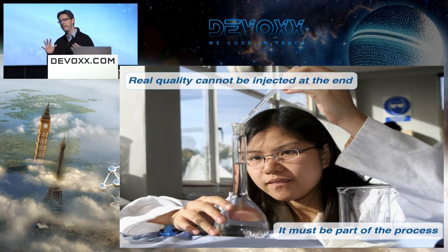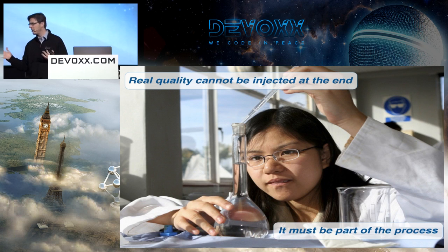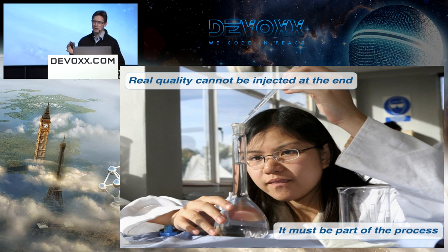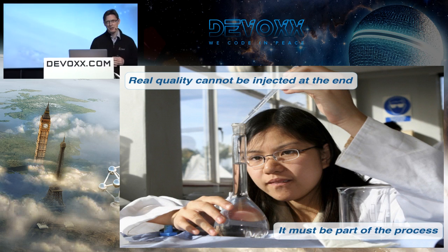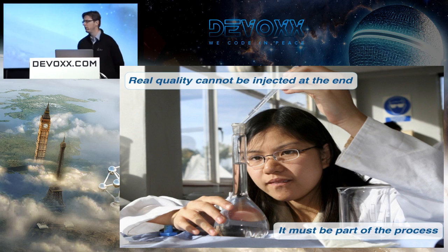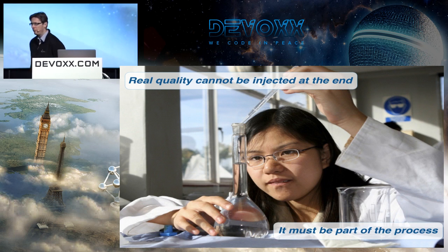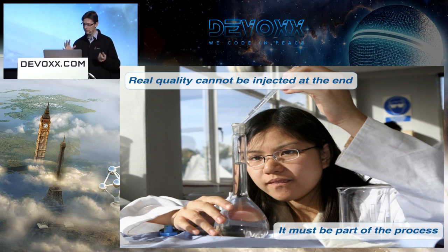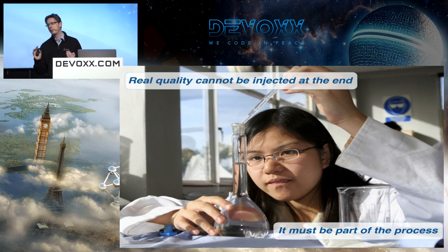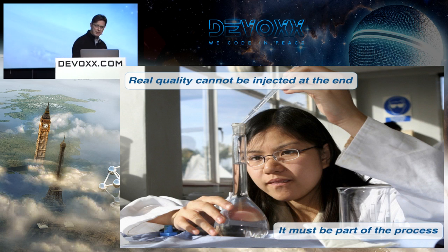You've got to get them in when you're defining the acceptance criteria and then helping with the automation to some extent. The extent to which they will be involved in automating will depend on your teams, but definitely involved in actually expressing the requirements. So typically when you define your acceptance criteria, you're going to have at least a developer, a tester and a BA together, known as the Three Amigos pattern. You can have the whole team, and the whole team's good, but it can cause meetings to drag on and on. But if you can get three people, a dev, tester and BA, that's a good compromise. You get different points of view, different concerns, enough perspective to make the test relevant and feasible.